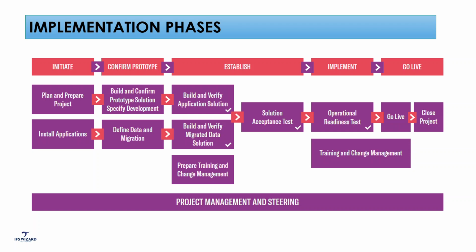As I said before, we have different environments, and typically we define one environment for migration purposes. We do different runs or trials of the migration to make sure we get clean data from the client, then we migrate it to the IFS application and see how the output looks. That's the basic idea of build and verify migrated data.